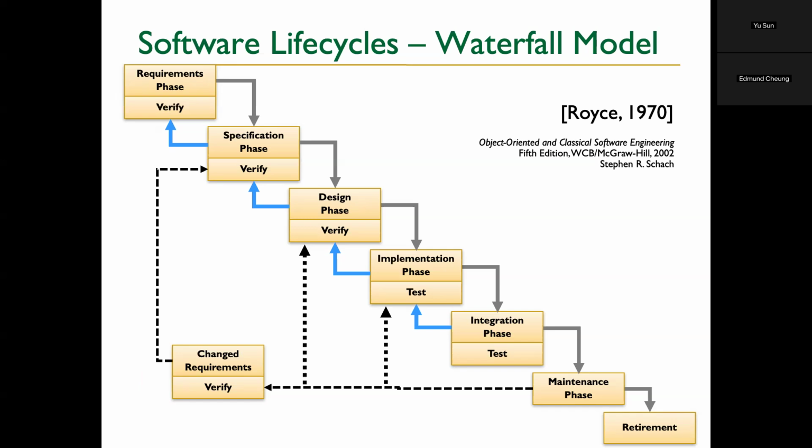That's called waterfall. But the most important thing is that the next step should depend on you successfully finishing and verifying the previous step. So this is actually a very straightforward, very reasonable way to do a project. Not necessarily just a software project, but a lot of other projects probably go through the same thing.